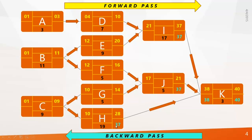Calculate the late start for I: 37 minus 17 plus 1 makes 21. For J: 37 minus 5 plus 1 makes 33. For H: 37 minus 19 plus 1 makes 19.